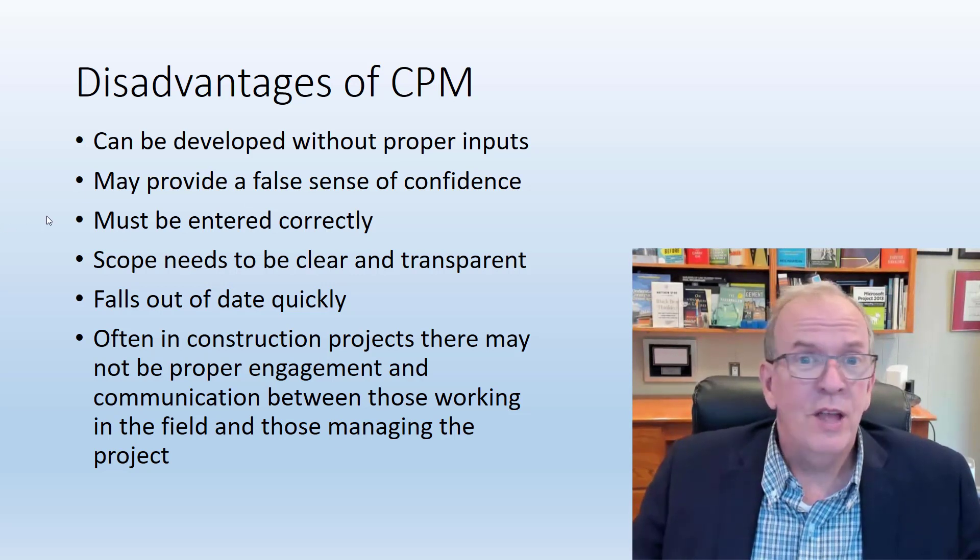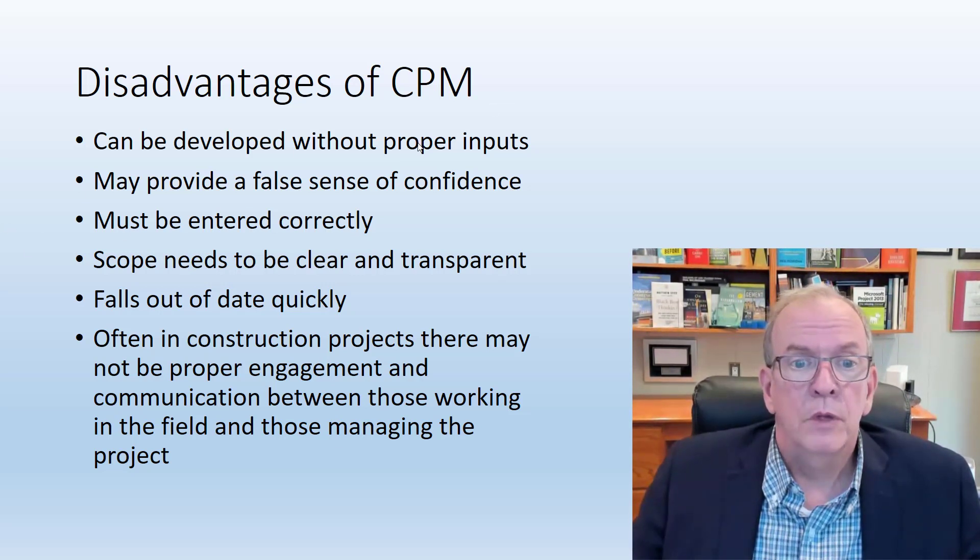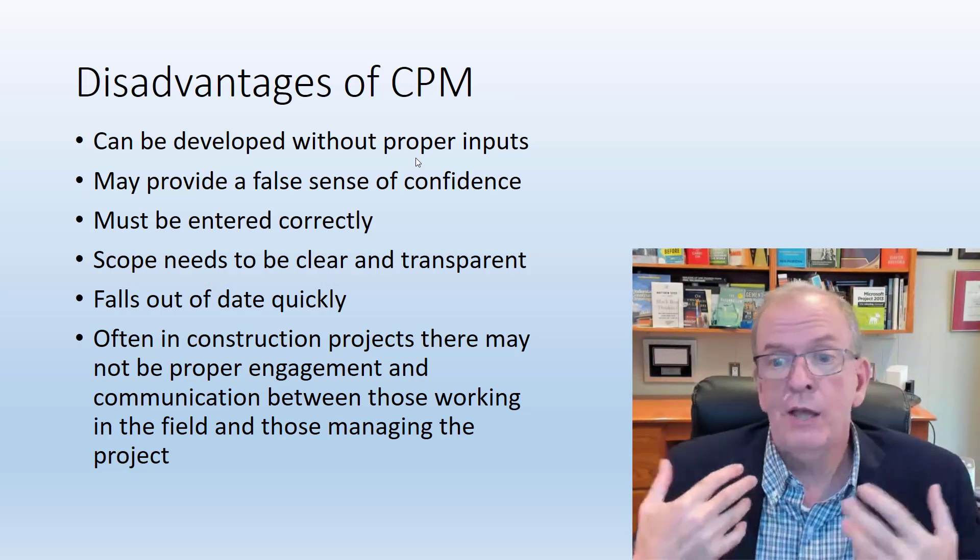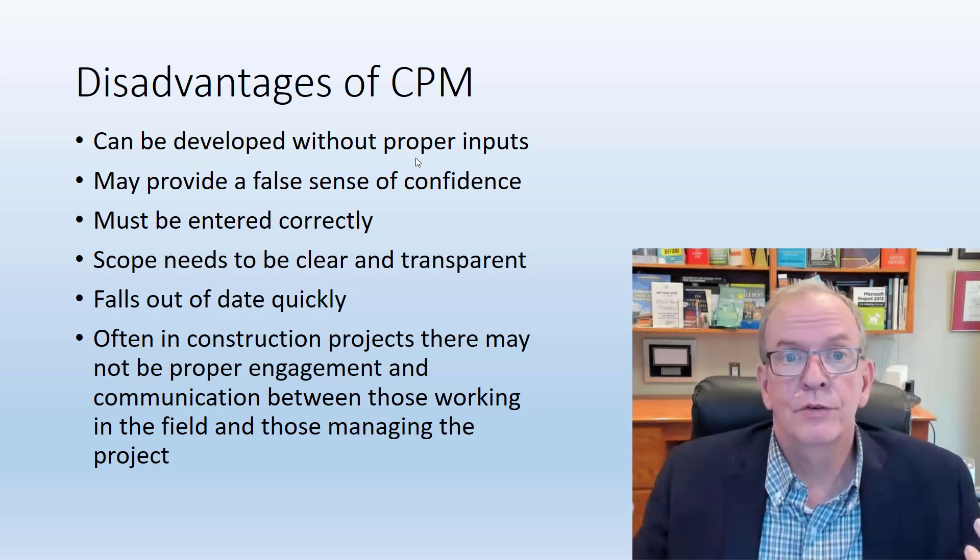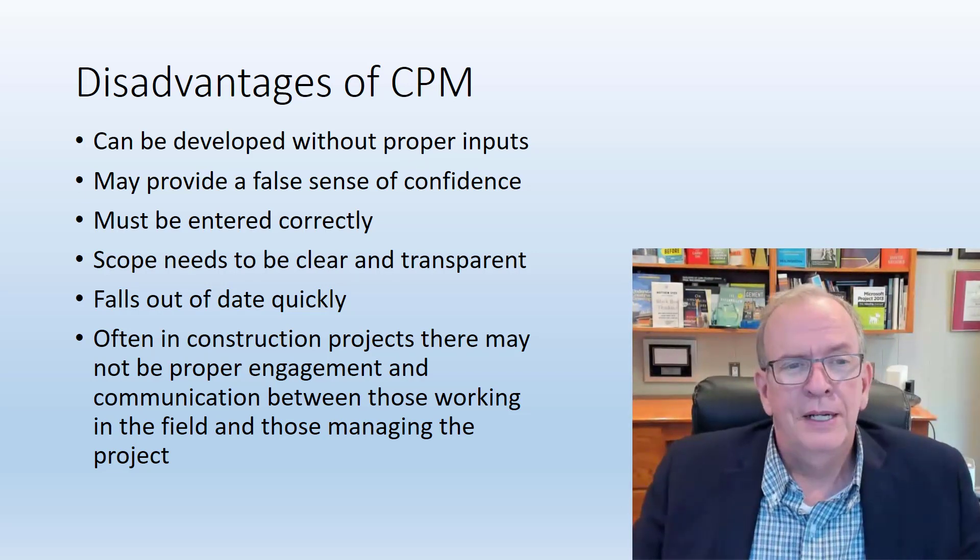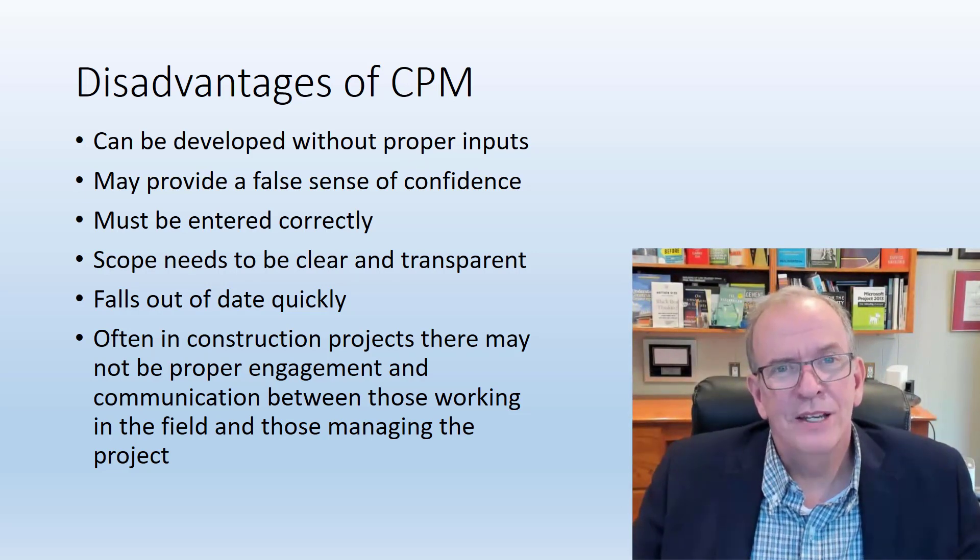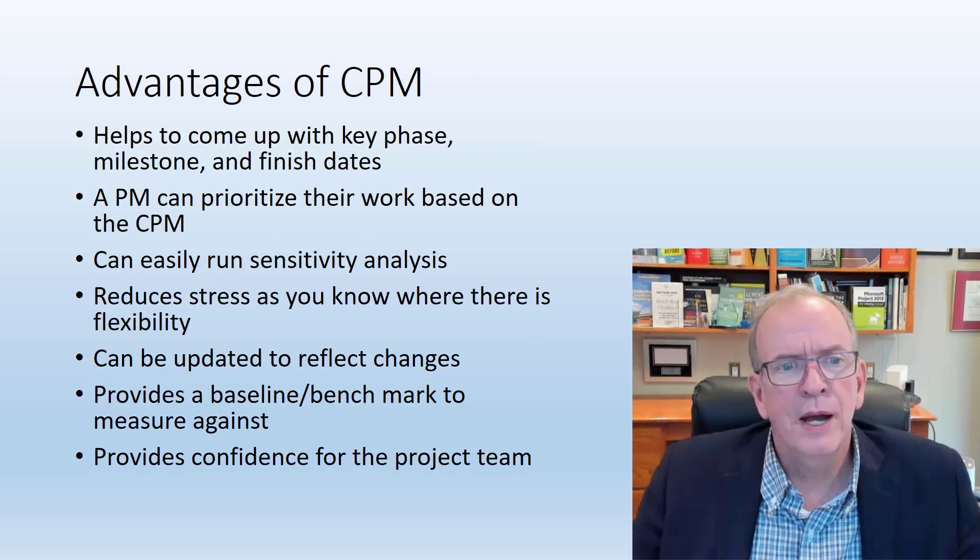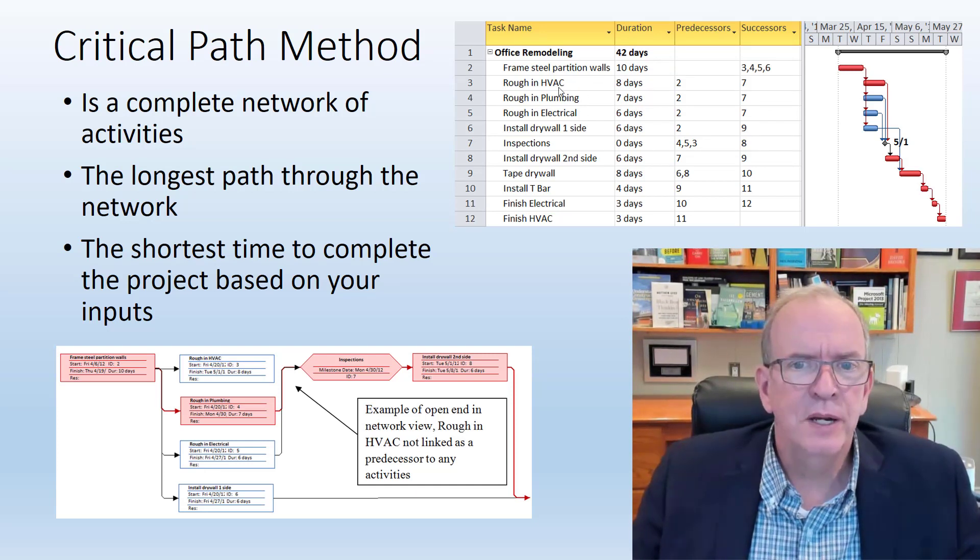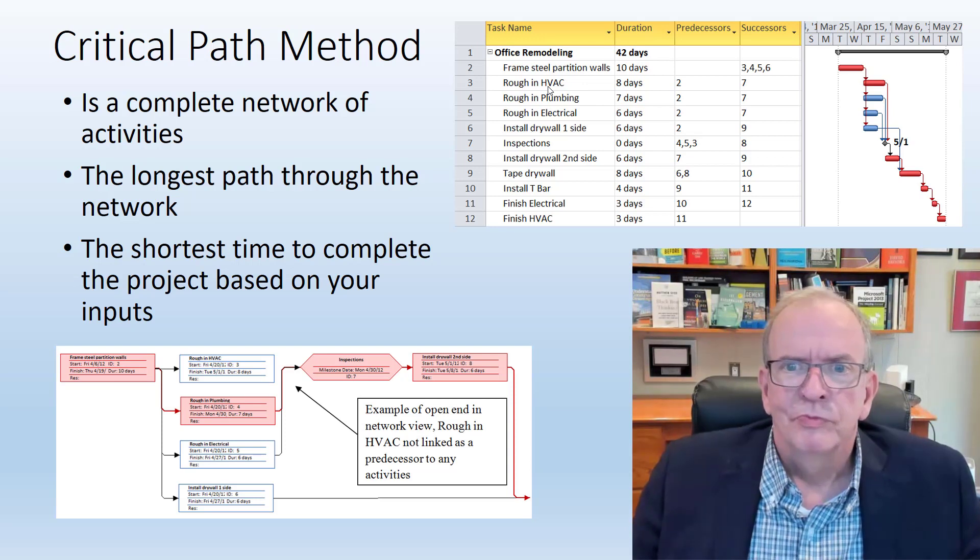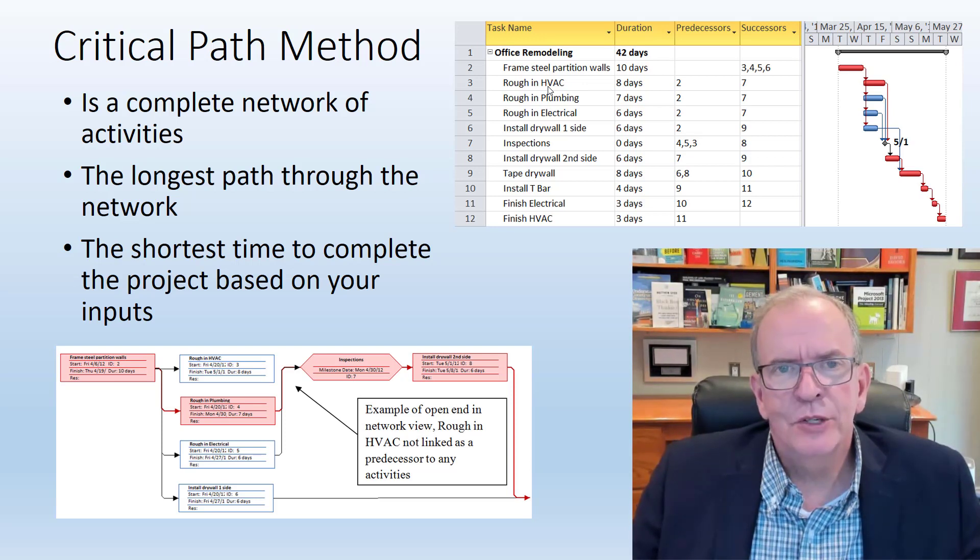Disadvantages, it's not perfect. One of the disadvantages is I could develop a master schedule for a big project and I could have all the timeframes in there, but is it right to the trade partners that are involved in the work? For example, if I go back here, if I just came up with eight days but I didn't really consult with that sub trade and the timing of it, they're probably not going to be in agreement with it. There's no buy-in to it.